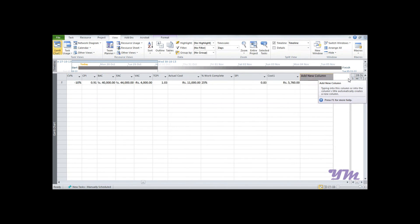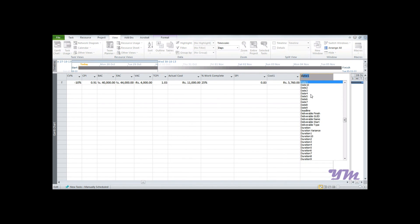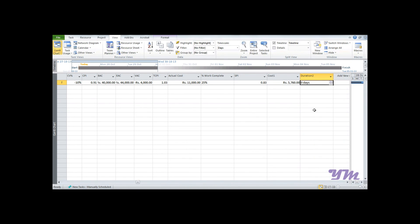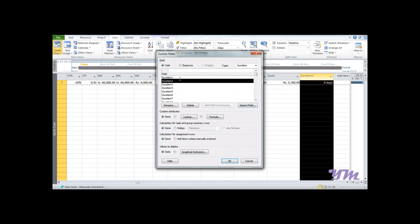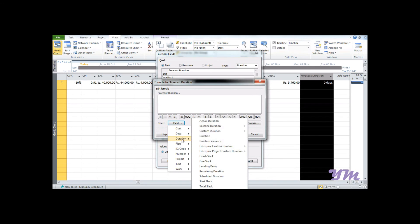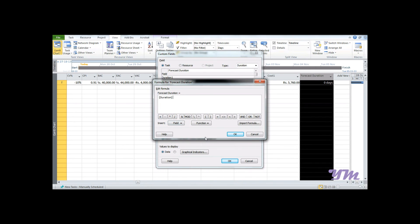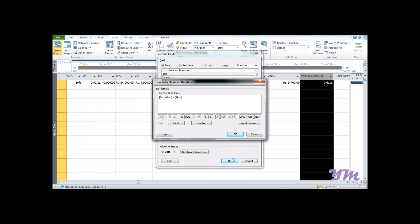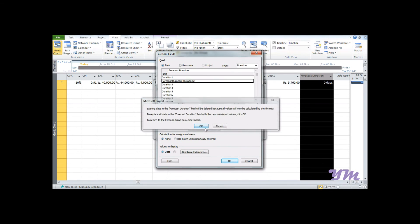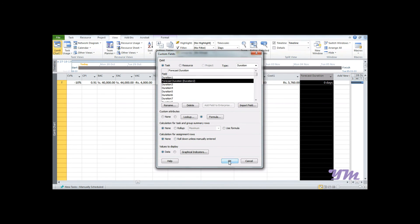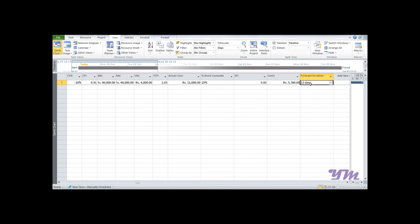Add a new column, select Duration2, go to Custom Fields, and we want to give it a name as Forecast Duration. Go to Formula, select Duration divided by SPI from the field cost, and click OK.